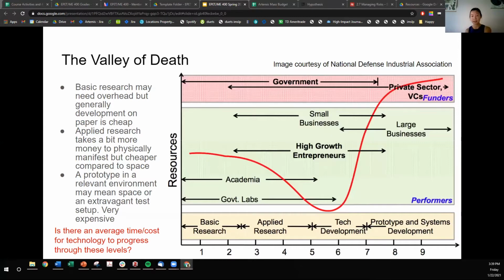After TRL 6, there's a significant cost to mature the abilities of products and systems so that those seeking to use them can be confident that they will work as advertised. This cost and risk is the first part of the Valley of Death that makes it so hard to transition a new technology or approach to real life. Even if the risk is low that a new invention will work as intended, there's still an enormous amount of cost and risk before successful implementation on or as a product.